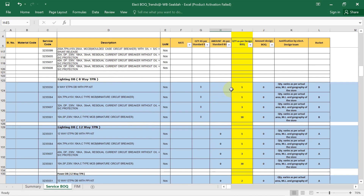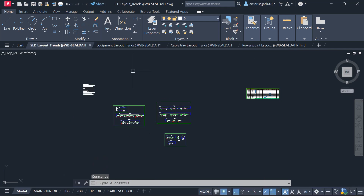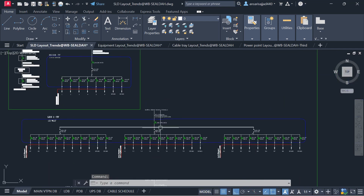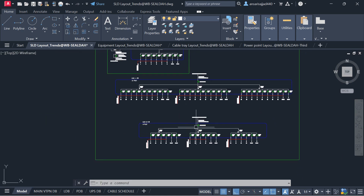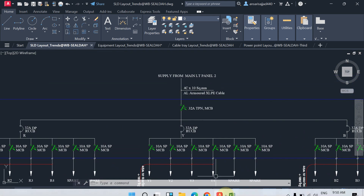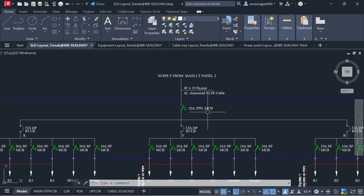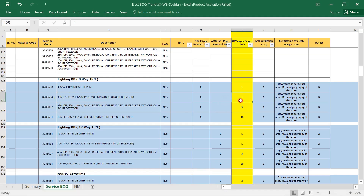For the lighting DB 8-way TPN, the quantity of the 32-amp TPN MCB is needed. To find it, open the SLD layout. For this 8-way TPN DB, you can see we have one 32-amp TPN MCB, so I am writing the quantity as 1.